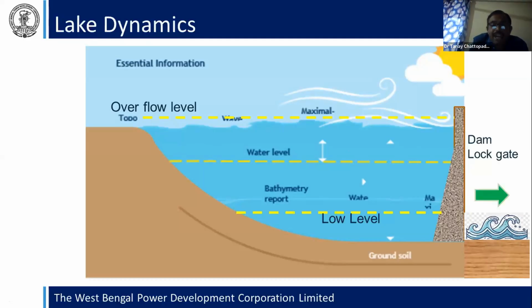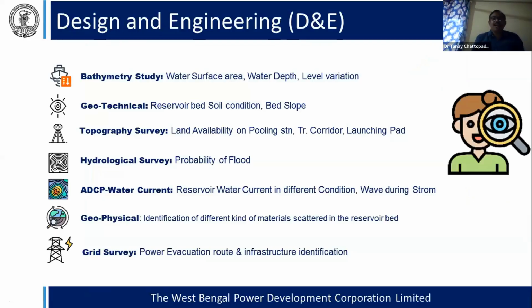And now this is the actual detail engineering before the dam. This is the detail engineering for the dam survey, because you have to take the bathymetry study first. That is, whether there is any undulation at the bottom of that dam.